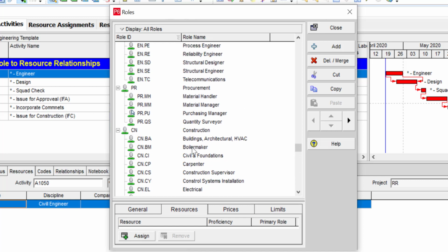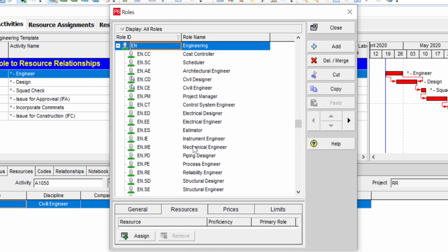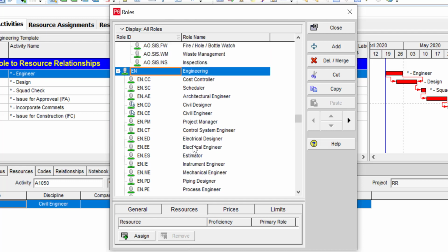So this is standard. This would be created one time and everyone uses these particular roles. You don't change them. You can actually lock them down. So if everybody's using this across the site or the region or whatever capacity that you want to use this at, you can get the overall, grand scheme or the capacity of what's actually being used from a craft perspective.